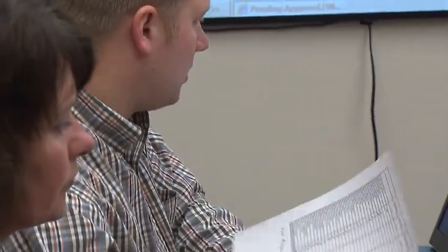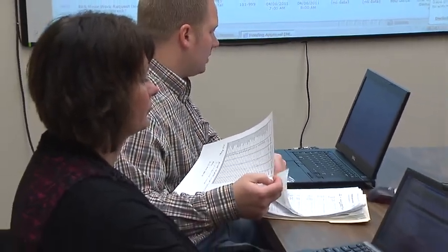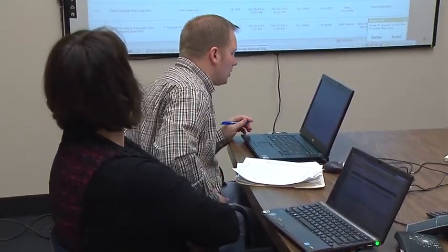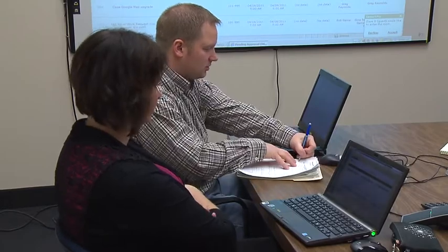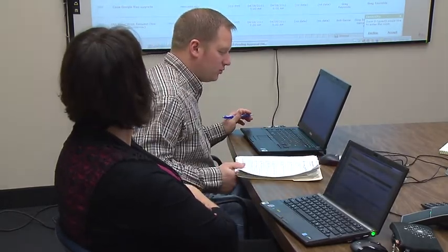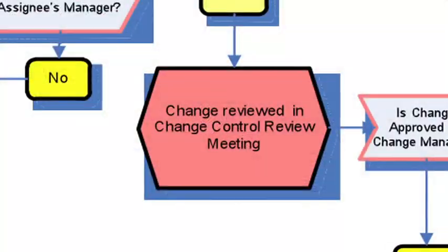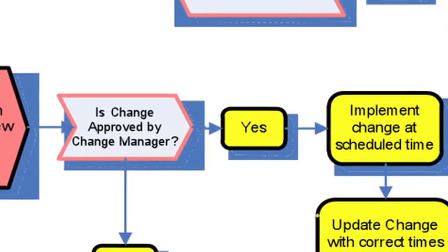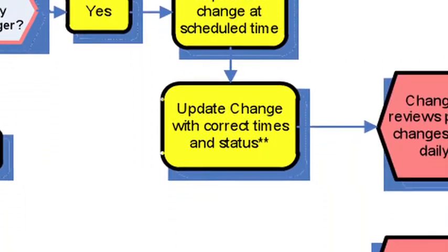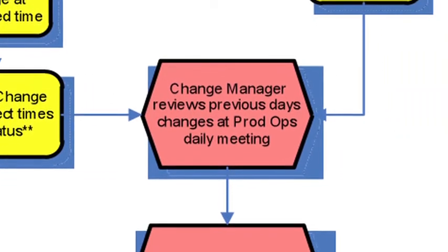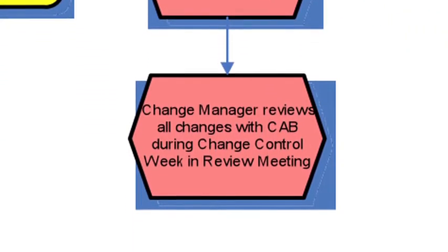In the change control meeting, it is reviewed by the entire team, not just the change control manager. The meeting is used to facilitate education and communication around what changes will be occurring and when they will occur. Impact assessments to the entire university are done in that meeting. The meeting is used to determine if the change should move forward or not. If the change moves forward, it's approved for suggested and requested time, and the change then gets executed and documented as such.